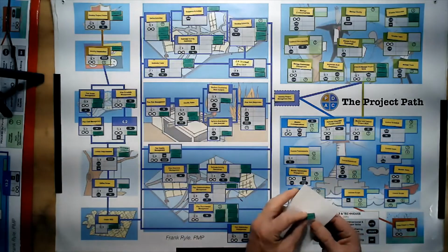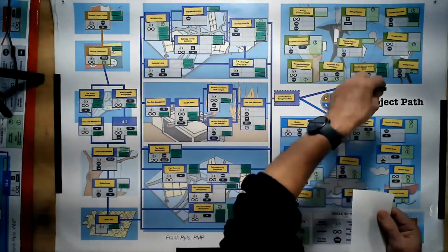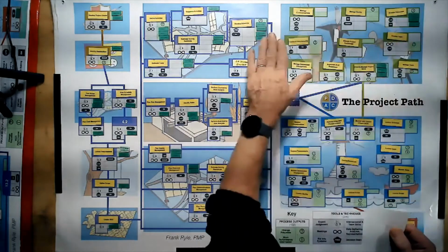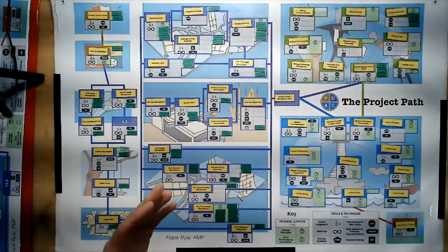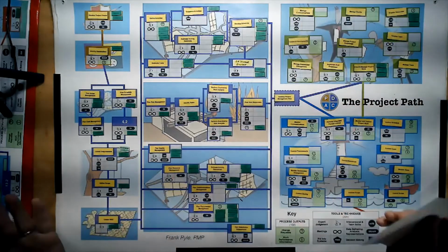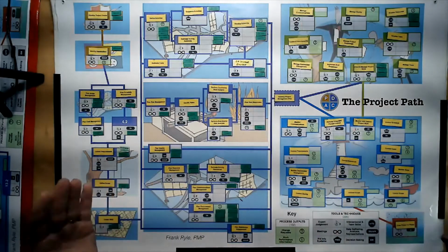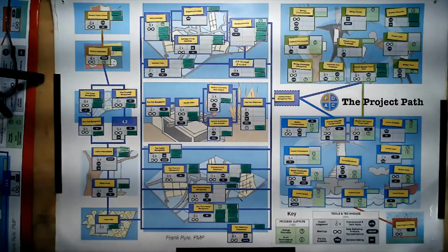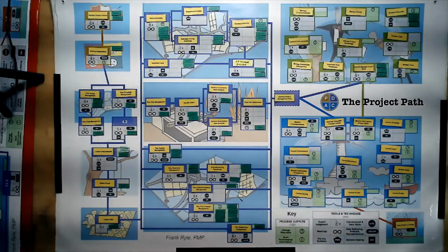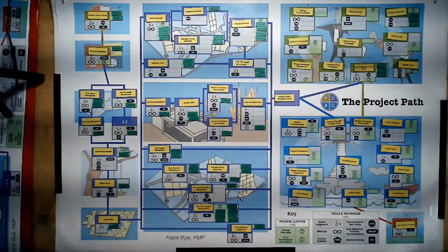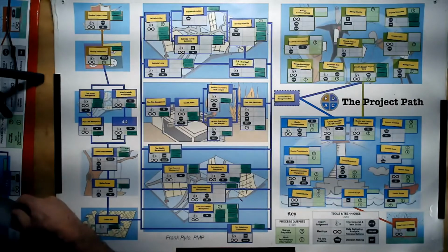And we're able to have a list of that. And the one thing that we add here, which is interesting, is the resource calendars. So the resource calendar is in addition to the project calendar that we had over here, but now we know that this person is Chinese and they celebrate Chinese New Year, whatever. You get the idea of Ramadan or Golden Week or St. Patrick's Day or whatever it is. We know more about that person, and therefore we know more about their calendar, their personal calendar, whether they're having a baby, whether they're moving house or something like that. We might know more information.